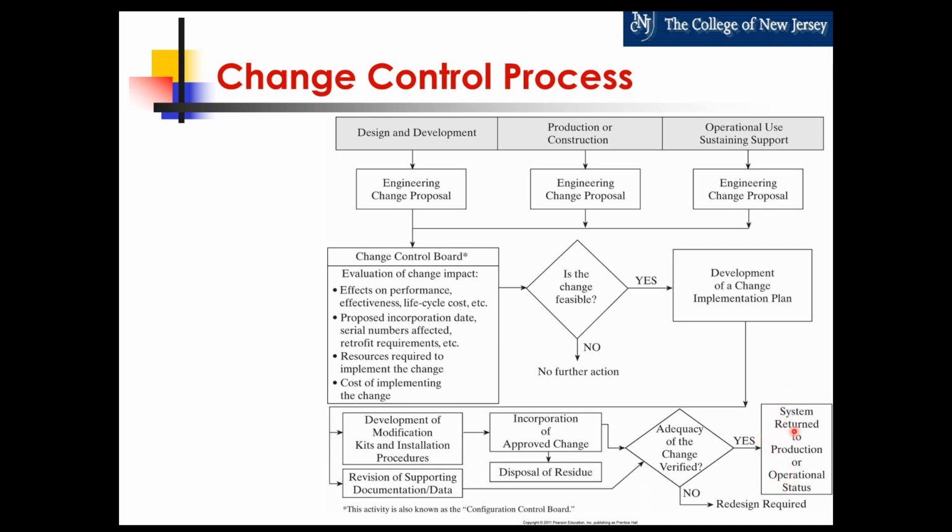So again, this could happen. So this is talking about some of the issues, whether you find it here or here. You can release your documentation to production if it's not in the field. If it's in the field, you may have to release modification kits or, worst case, recall product. Again, that's a very bad thing.